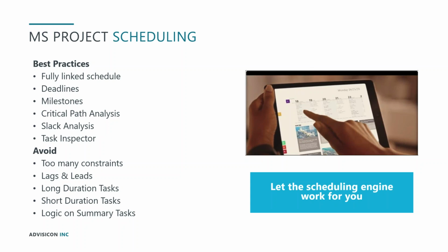In building the flow through our particular project schedule, we want to create parallel paths through the schedule as much as is practical in order to shorten the overall duration of our project.